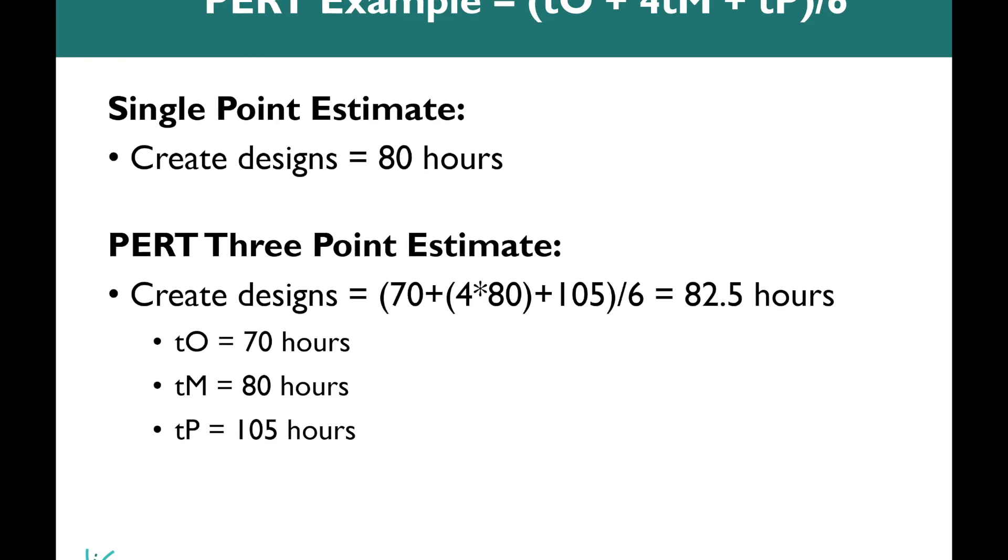So you can see comparing the PERT estimate, which is 82.5 hours to the single point estimate, which is 80 hours. It's a bit more accurate. And this is the main goal of using PERT, which is that three point estimation technique.